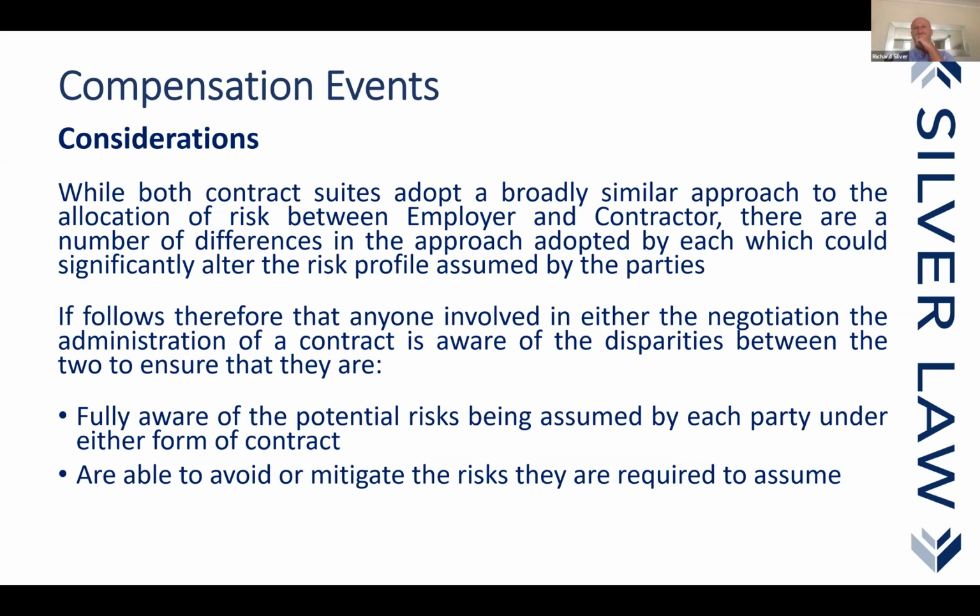So let's just give an example. The contractor is paid what they've incurred, it's 10 million. They then work out what is the value when we take into account all the compensation events, and it's worked out the actual value is 9 million. The contractor has effectively been overpaid and has to repay money. So you're paid as the job progresses based upon what is the cost. That's the same under option E as well. If that person wants to send me an email, I can probably clarify in more detail. It's a bit difficult in the limited time that we've got.